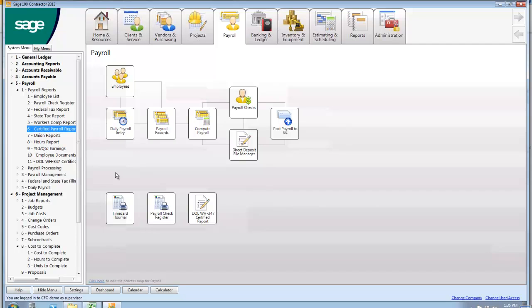What else we got? Certified workers' comp is just as easy. Job cost does include all the burden. So your FICA, FUTA, SUTA, vacation, sick pay if you have it, 401k matching, whatever payroll calc you have, we can recreate so that that burden gets to the job. And you can enter it on that daily field report, or you can enter it weekly like we talked about a little while ago, just in the time card.